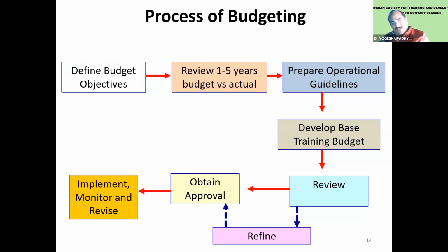So implement, going ahead, monitoring whether we are on track or not, whether spending is right for the plan or not. Then if we need more money, we have to put up a supplementary budget. Or maybe we have to take money from some other head, and then report results. So reporting, quarterly reporting, because they will be asking how much you have used. So planned versus actual, whatever frequency is decided, you have to report.